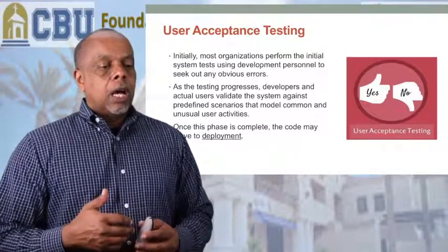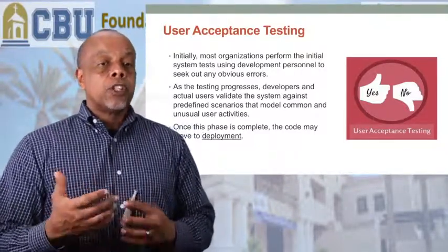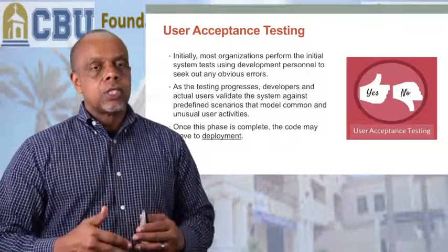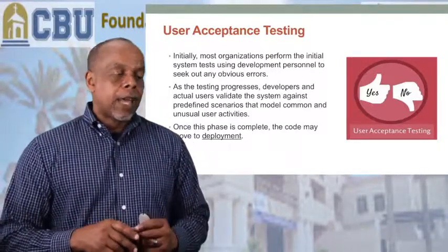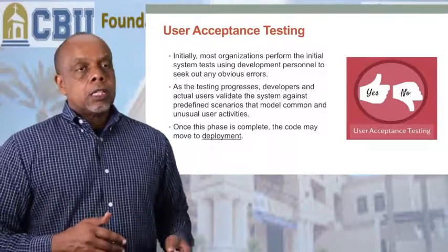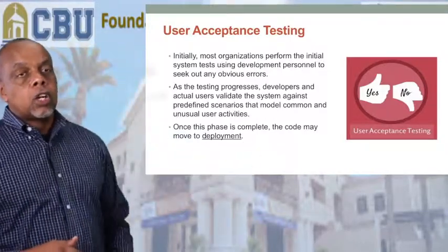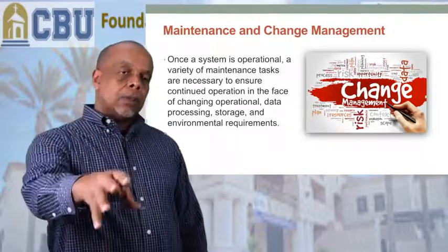So you need a plan of action and milestone and a deficiency chart so you can track your deficiencies and get those closed out on what we call a POAM, your plan of action and milestone charts. But once we get there, now we're going to start deployment. We're ready to get it out to our customer.